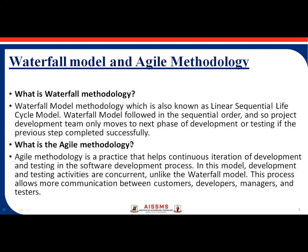What is the waterfall methodology? The waterfall model is also known as the linear sequential life cycle model. It follows a sequential model where the project development team only moves to the next phase of development or testing if the previous phase has been completed successfully. For example, to begin coding, the design phase must be completed first.